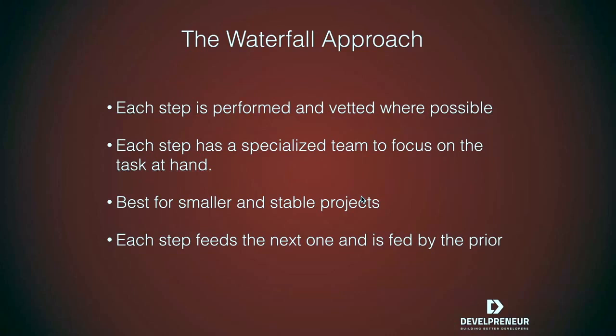In general, as we talk into the comparison and contrast, Waterfall works better for smaller kinds of projects, things that are shorter periods of time and stable. If you change requirements a lot, then obviously you're going to have issues. If you've got this documentation and you've gone through requirements, you've gone through design, you get an implementation, and everything goes back and is based on those requirements.